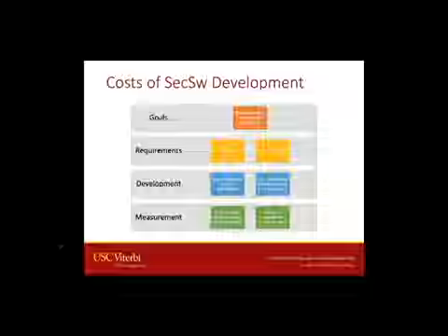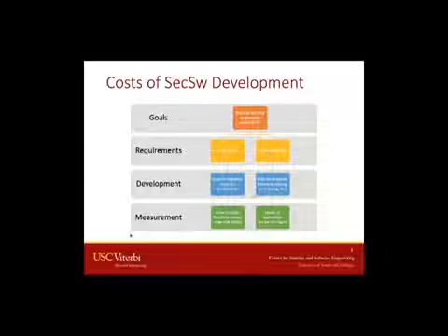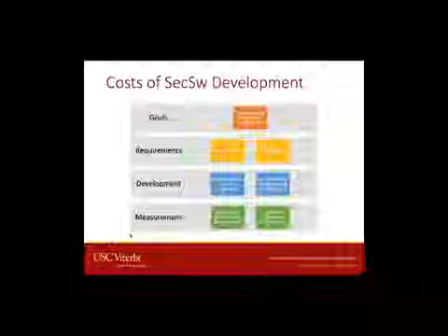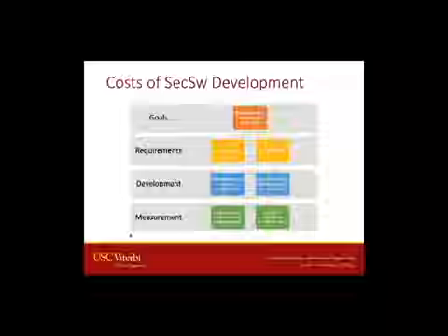On the other hand, we have all these security practices that are non-functional, like doing security reviews, penetration testing, threat modeling. These practices don't increase the size of the software, but they need to be conducted to try to prevent and detect vulnerabilities both in the security controls and security features and in the application features.